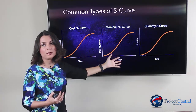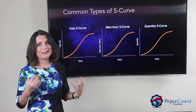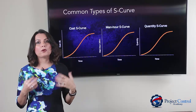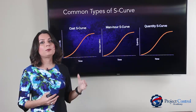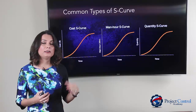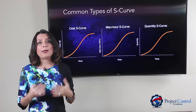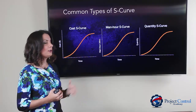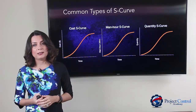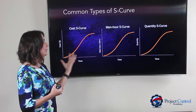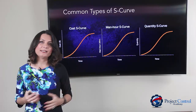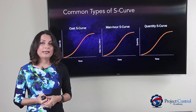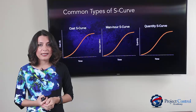Another type of S-curve you will see in projects is the quantity S-curve — showing the quantity of material, equipment, or something you want to measure against time. It's a very good comparison curve for comparing what you were planning in terms of quantity versus what you have actually accomplished or installed. These are the three most common S-curves in project control reports.